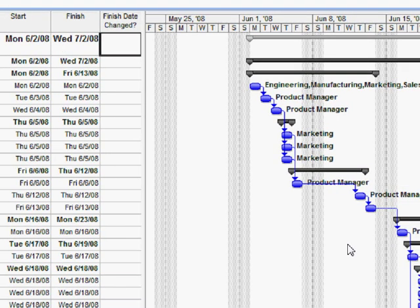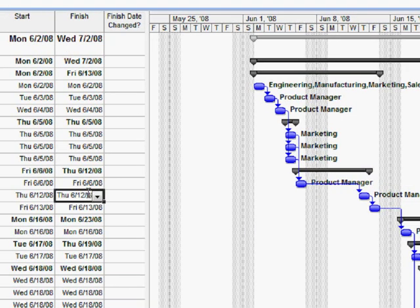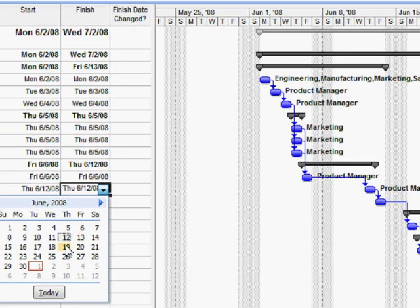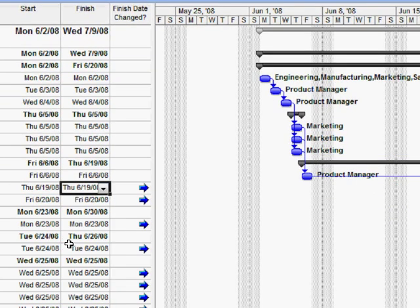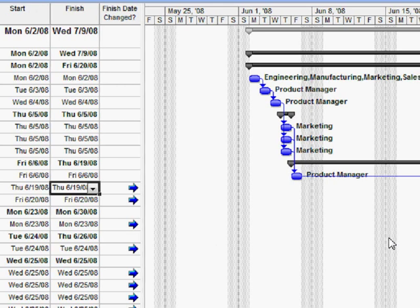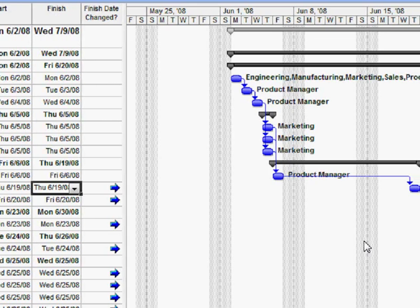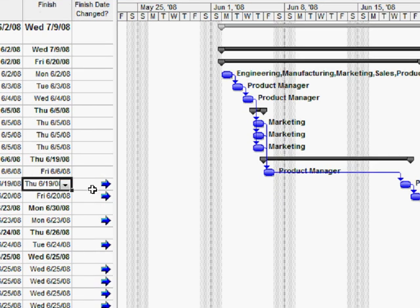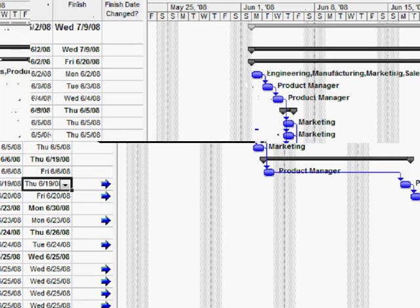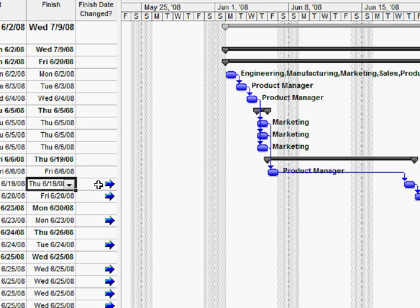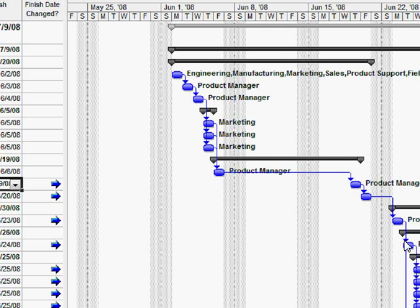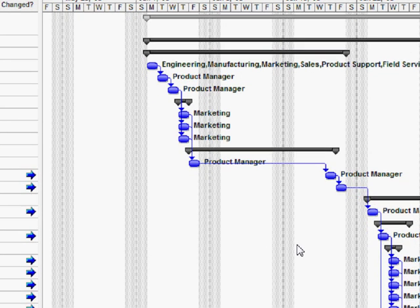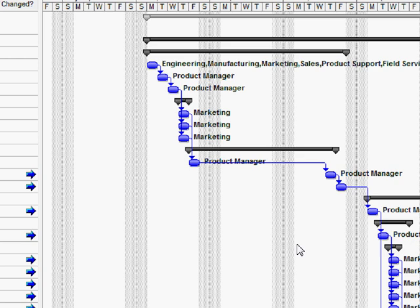Let's imagine we're now going to make some changes. Let's look at Task 12 here and change the Finish Date from 6-12 to 6-19. Notice that over on the right, the task does move out. But more interestingly, I've got an indicator here that shows that task has slipped to the right by seven days. If you hover over it, it says exactly how much it's slipped. Look further down and you'll see all the dependent tasks have also slipped.